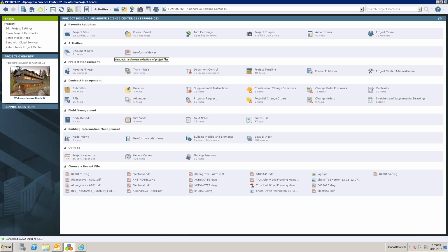But after the project is completed, you still want this information because the statute, I want to believe, on a project is 7 to 10 years, depending on your state. So you're going to want to keep this archive for 7 to 10 years, or maybe longer. Yeah, we actually keep ours, since we're the owners of the buildings, we keep them indefinitely. Yep, that's a really good idea. Yeah, we do modernizations 20, 30, 40 years later, and sometimes it's good to have some of these documents. Yeah, just makes sense.